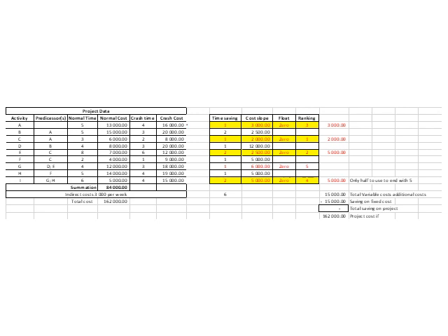Your crash cost over your normal cost will give you your increasing cost, divided by your normal time minus your crash time, which is 1. So you have an increase of 3,000 rand here. Okay, and then we do that for the other ones on our critical path.